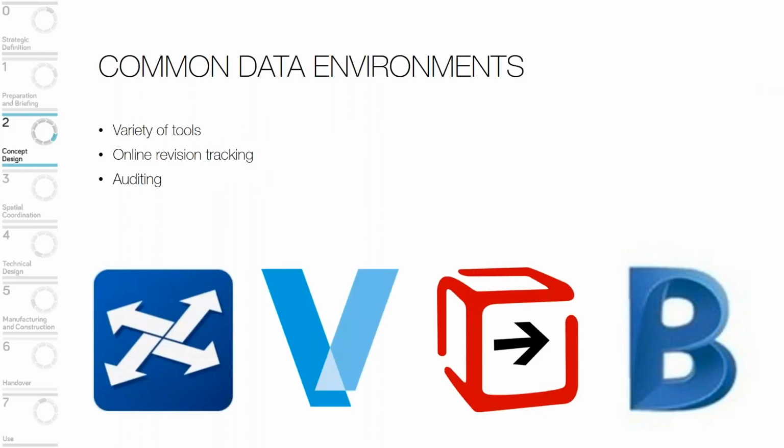Common data environments are quite key as well. So I kind of like these tools because they're auditable, they're trackable. We have to set them up very carefully. So when we talk about workflows, and especially when we're talking about a formal approval process, we have to be incredibly careful. So the ones that we tend to get involved with quite a bit are ProjectWise, Asite, Autodesk BIM 360, and Viewpoint for Projects. So those tend to be the general tools that we end up using. And the access rights and the workflows are all the things that we set up, and we try to make them bespoke for each project so that they actually suit how the client wants to work.